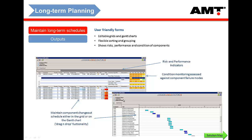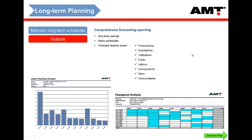By maintaining this component change-out schedule, you are updating the life cycle costing in AMT and all associated reports. These include productivity forecasts, availability forecasts, utilization forecasting, costs, labour requirements, component forecasts, specific part number forecasts, and consumable requirements. All of that is dynamically updated as you move items on the Gantt chart — it automatically updates all other associated forecasts and forecast reports.